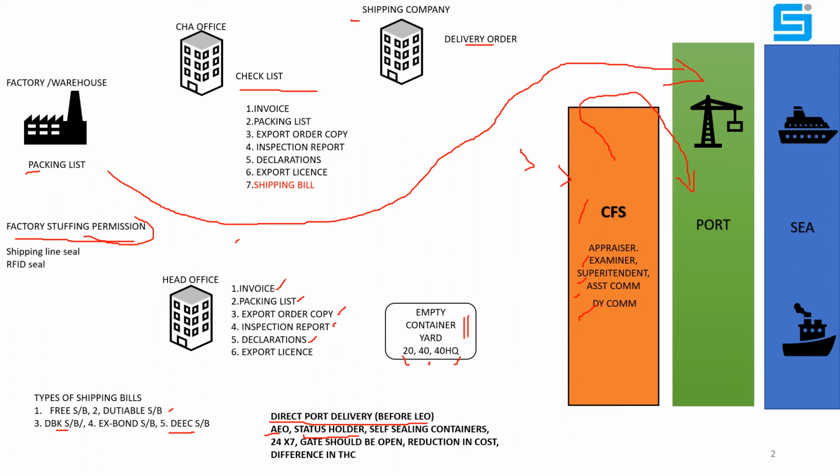Therefore, cargo will move to the port directly to save your time, because otherwise it will go to the CFS, and then to the port. It takes time because it is lying there for 3, 4 days, then it will move to the port. Going directly to the port helps in the reduction of cost.